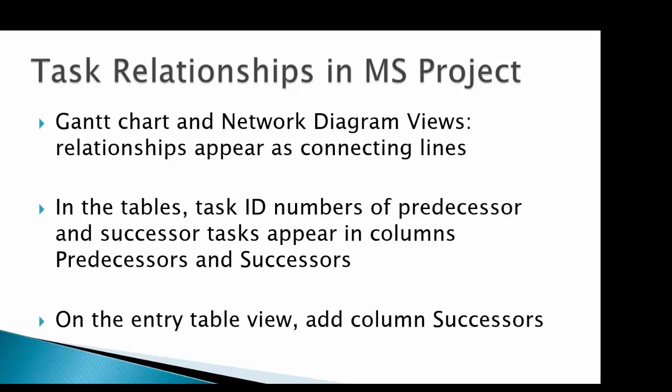One thing we may want to do before adding dependencies is neaten up our view a little bit. Using the drag and drop feature, we can move the work and duration columns to be next to each other, as well as the predecessor and successor column. It might also be a good idea to show the type column, which will show you the type of each task. All the tasks you create should be fixed work, with the exception of summary tasks, which are always fixed duration. Add either the predecessor and/or successor column as necessary.